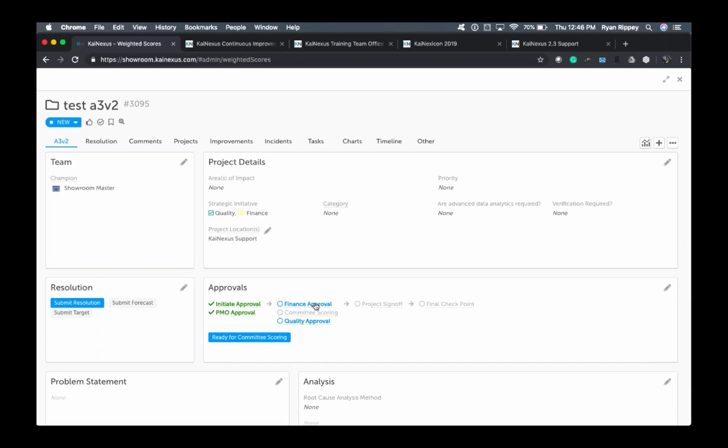Now what we can do is we can set it up that you must have edit permission on the item in order to approve the milestone. So what this would do is it would essentially eliminate the ability for someone with that permission to go approve a milestone on a project that they are not a team member on. Okay, so now we can put those particular